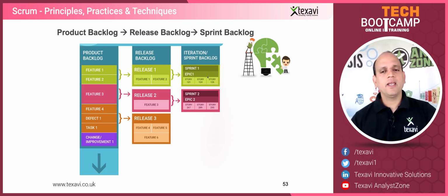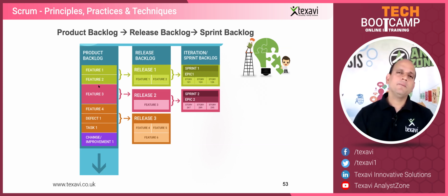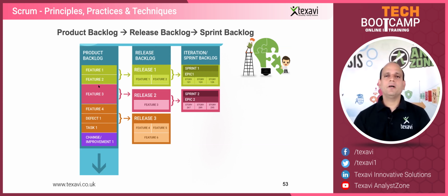The sprint backlog, again, is basically owned, updated and managed by the team. And this is the huge laundry list of the product backlog. It grows and grows and grows. As I said, there were at one point 1,200 items in just about 3 months, and then the backlog that I managed actually grew to about 6,700 or so items in a span of 18 months, 1.5 years.